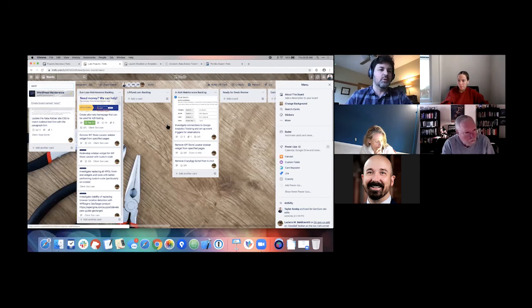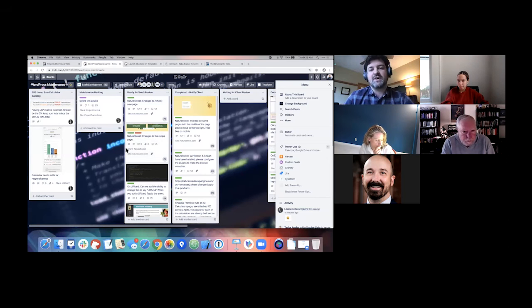And similarly, like on the WordPress maintenance board, in the past, all of these 30-some projects would have been their own board, right? And so every 6 months, maybe you get a card on some random board that you've never seen before saying, fix this issue. And you're wondering, okay, well, is this important? Can this be ignored? What we've established with our team that does all of our maintenance is basically to say, okay, the top item on this list is always the most important priority. And we're going to reorder this list of backlog as we go to make sure that it's always ordered by priority. So there's never any question about what's the next item on your list to tackle and things like that. It's always going to be the top item on the list. And so that, again, that's been a real helpful iteration for us.